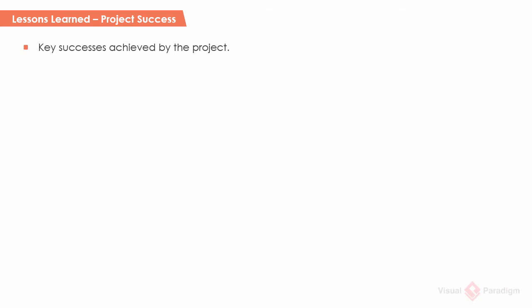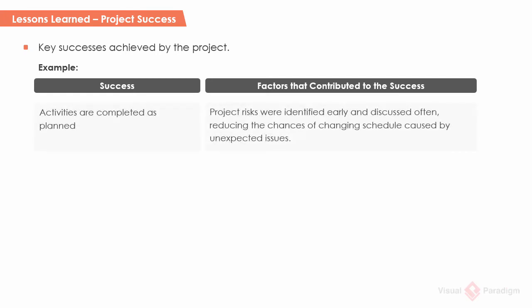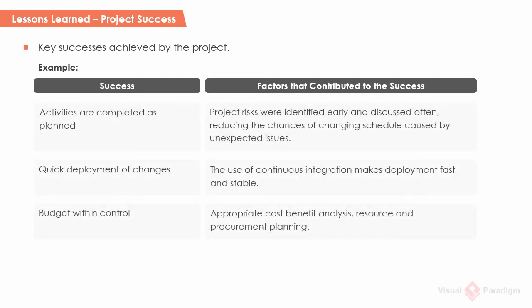Project success refers to the key successes achieved by the project. Instead of just describing the successes, it's more valuable to state the factors that contribute to these successes so that similar projects can repeat them. For example: the project activities completed as planned. Factors contributing to this success include having project risks identified early and discussed often, which reduces the chance of changing the schedule.